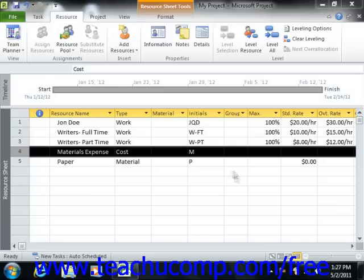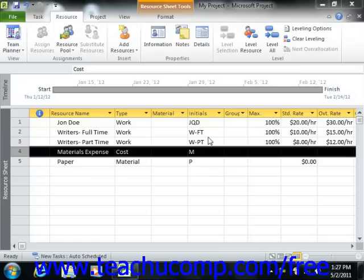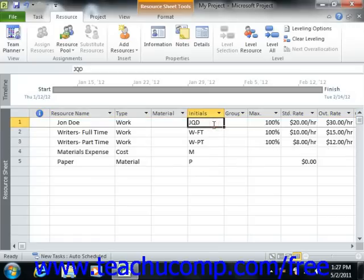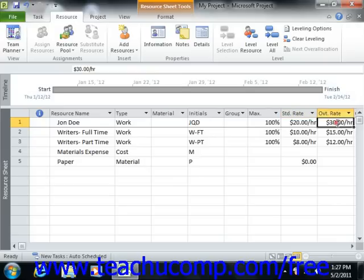You can enter the default costing information of a resource directly into the resource sheet view of your project file. For work resources that are also people resources, you can enter their default pay rates into the standard rate and overtime rate fields for the resources that appear in the resource sheet view in Microsoft Project.